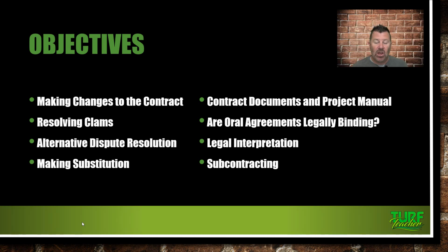Yes, we have our GC license for things that could help us out in the landscape world, and we just have it for kind of, just to have it. It's one more page on the resume, you know what I'm saying, or license in the portfolio. But when it comes to hiring subcontractors, you got to have that payment schedule. You got to say, hey guys, you need to submit your pay application by such and such date to get paid on such and such date.